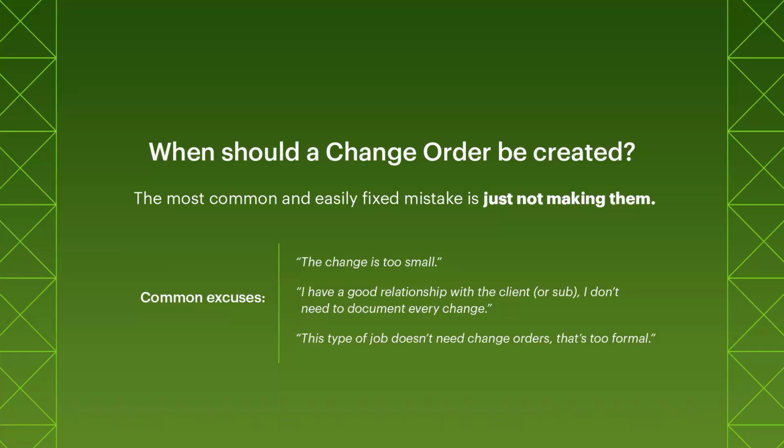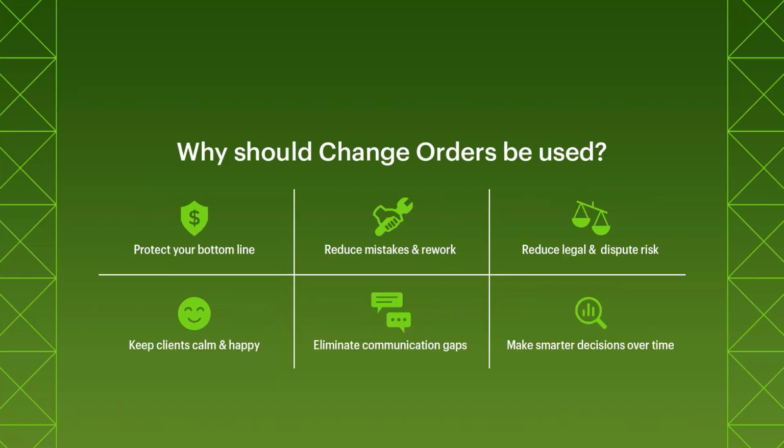And one message that we want you all to come away with today is one that we have tried to make creating change orders in Construction Online quick and easy for you, because really a best practice is going to be if the scope of the project is changing, you should go ahead and create a change order. Even if it's a quick one, even if it's a small change, go ahead and get that change order logged in the system. You'll be glad that you did.